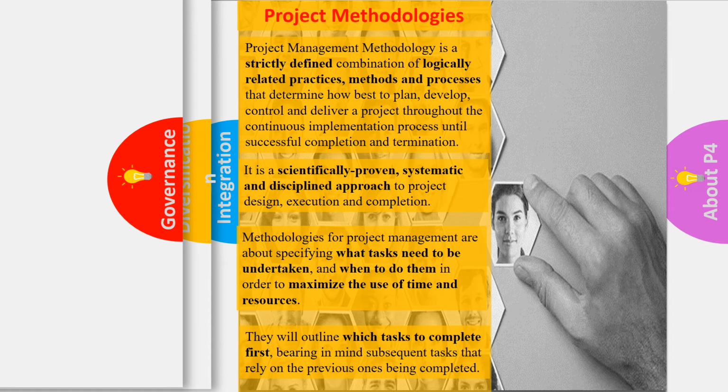In addition to that, project methodologies will outline which tasks to complete first, bearing in mind subsequent tasks that rely on previous ones being completed. So, depending upon your project, there are some tasks you can't start until other tasks have been done. If you're looking at the building of a house, well, you can't start building the structure of the house until you've done the foundation. So you move on from one task to the next. But there are some tasks that you can do at the same time. So again, it's really looking at those tasks to complete first.